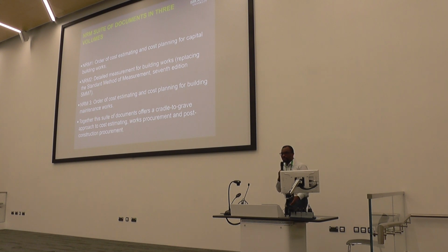So let's assume the quantity surveyor is going by a bills of quantity method. The quantity surveyor will then take off and quantify the various elements within the drawing. So the quantity surveyor will probably tell us, oh, for this building, the block work is 5,000 square meters. The concrete work is maybe 2,000 cubic meters. Concrete work in, let's say, slab is 2,000 cubic meters. The floor area for tiles maybe 200 square meters. The quantity surveyor will then estimate the actual quantity.